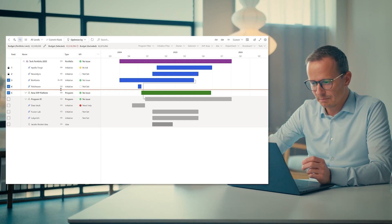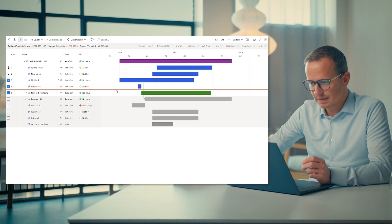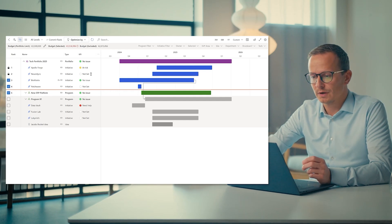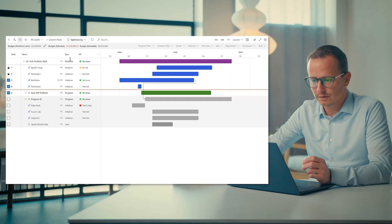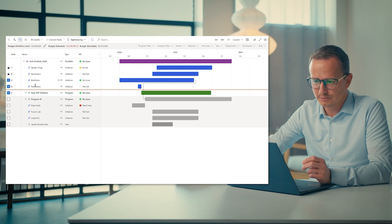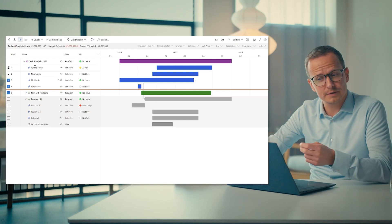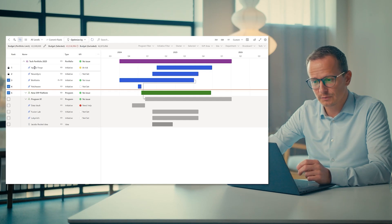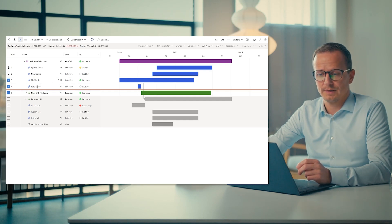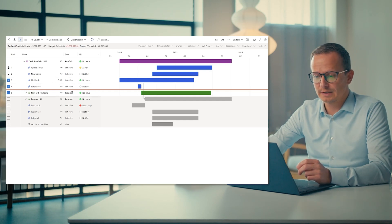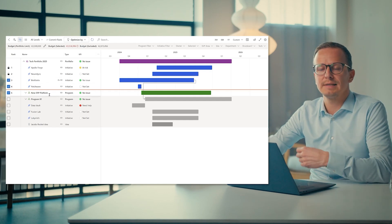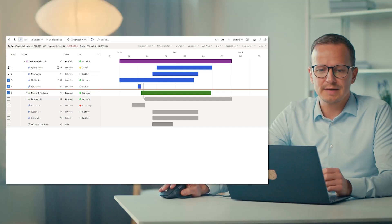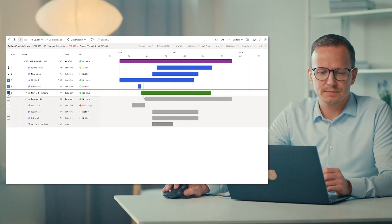So if we look at the bar in the middle here, this represents the budget line. So accumulated, the running totals from the first selected projects here only allows us with the current budget to pick up project 1, 2, 3 and 4. We have also picked up this program, which is why we are exceeding the budget limit.